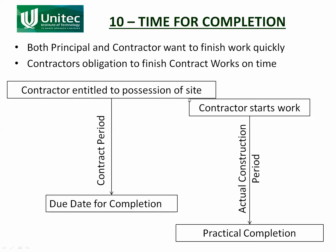The contractor is entitled to possession of the site. The contract period starts — the clock starts ticking — and it stops at the due date for completion. So that is the contract period as defined at the beginning of the contract. That is the theory.